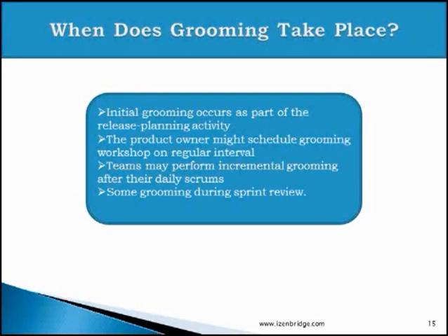The team may decide to do incremental grooming. Incremental grooming is like, at the end of the daily Scrum meeting, they may spend say 15 to 20 minutes in grooming the newly identified or newly refined product backlog items. So at the end of a daily Scrum meeting, the Scrum Master or product owner may call for grooming, or ask the team for input on newly refined product backlog items, and the complete team or selected team members, whoever is linked with that particular product backlog item, may participate in that grooming activity.